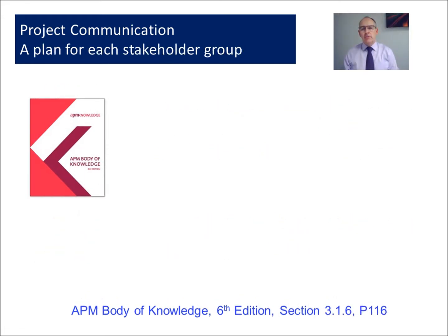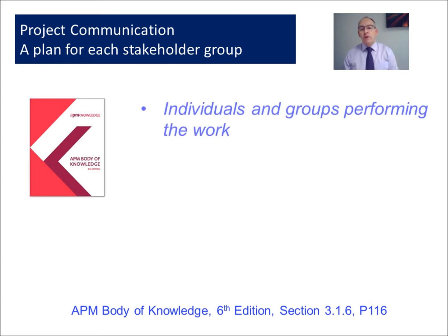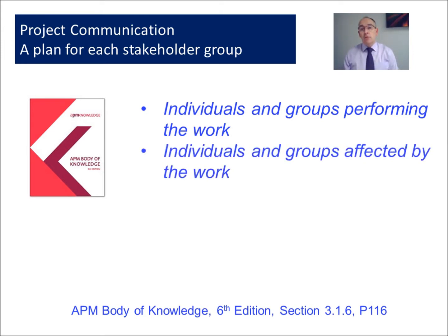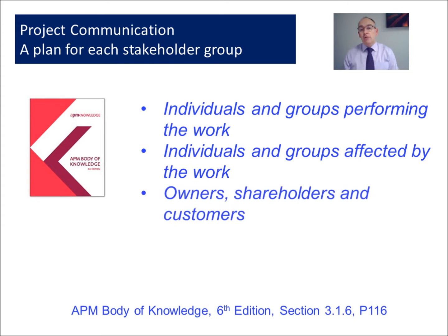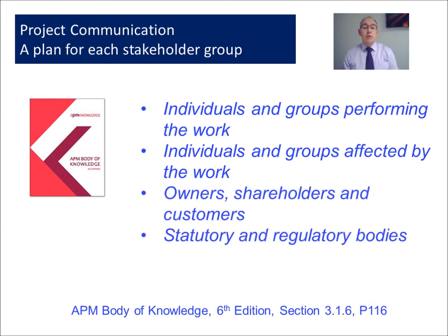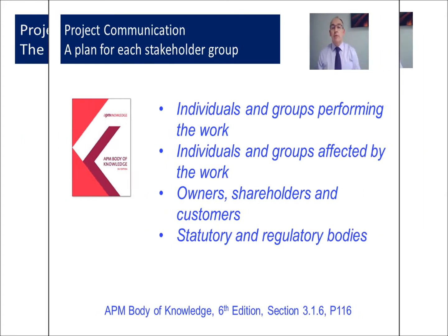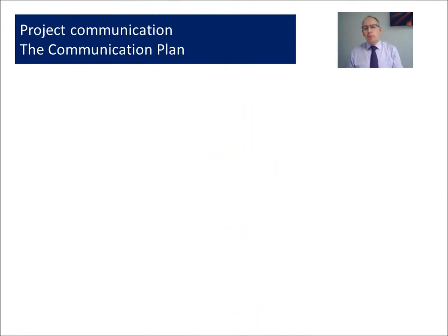We need a communication plan that covers each of our stakeholder groups. There are those individuals and groups performing the work, the individuals and groups who are affected by the work, owners, shareholders and customers, and finally there may be statutory and regulatory bodies who we have to communicate with.